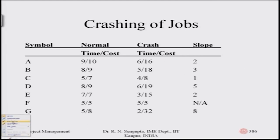The slope for activity B is three — that is the cost increase per day of reduction on a standalone basis. For activity C, it is eight minus seven, which is one, divided by five minus four, which is one — so one divided by one is one. For activity D, nineteen minus nine is ten, divided by eight minus six which is two — giving a slope of five. For activity E, fifteen minus seven is eight, divided by seven minus three which is four — eight by four is two.